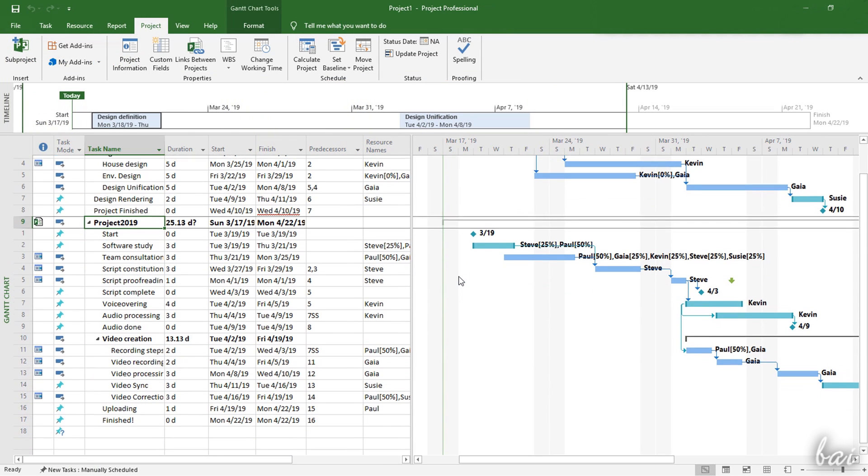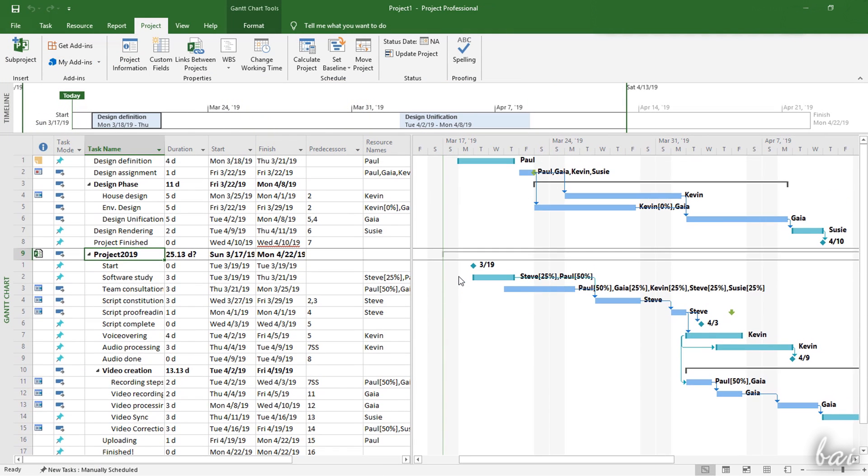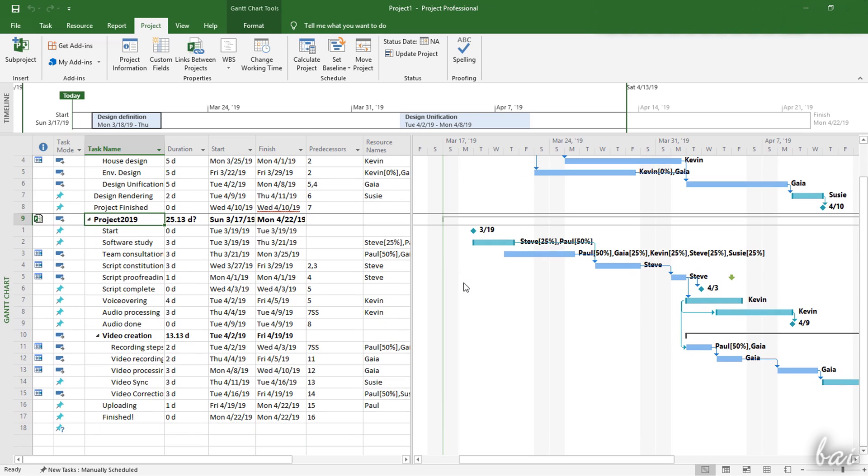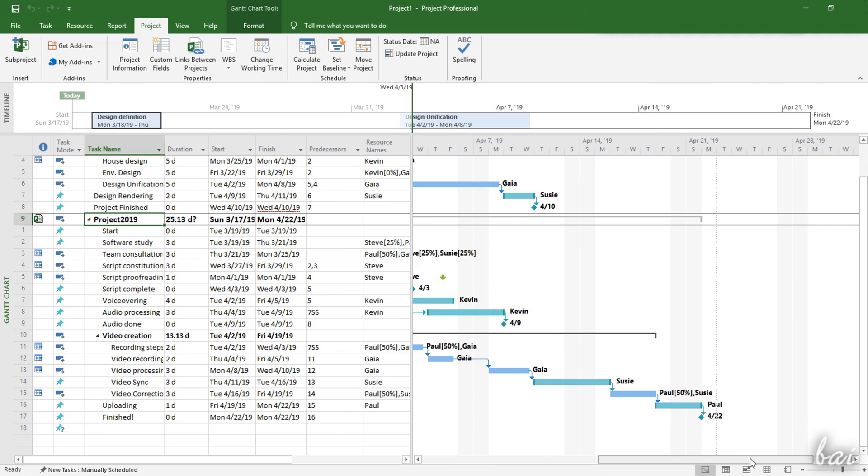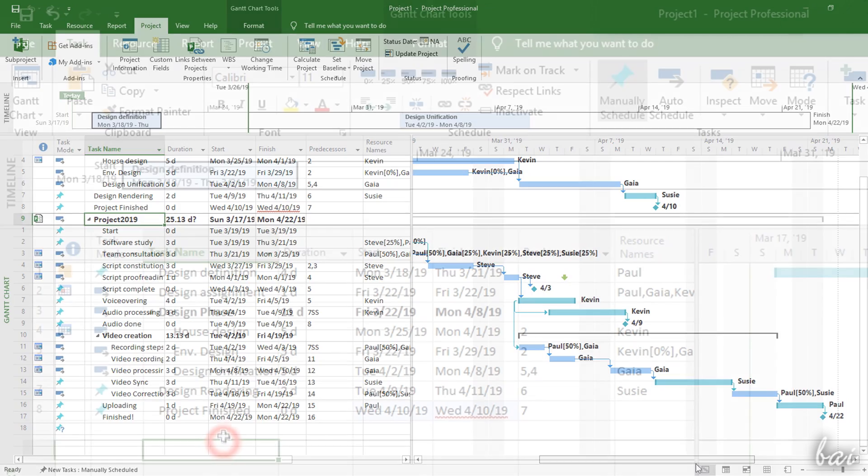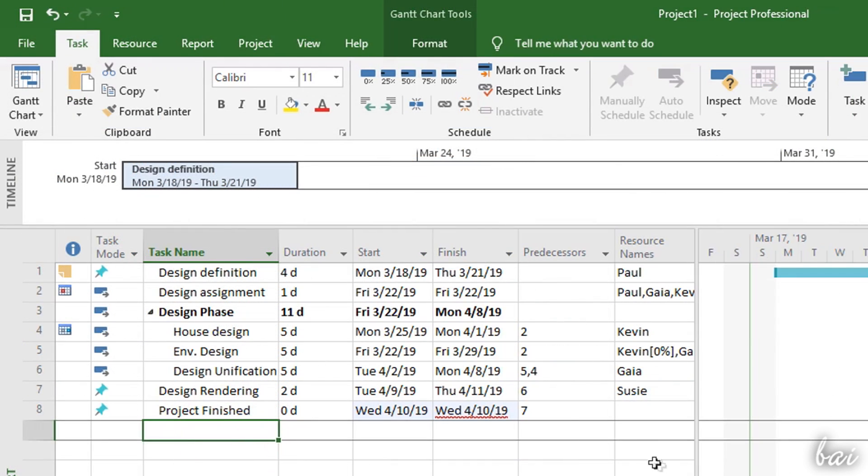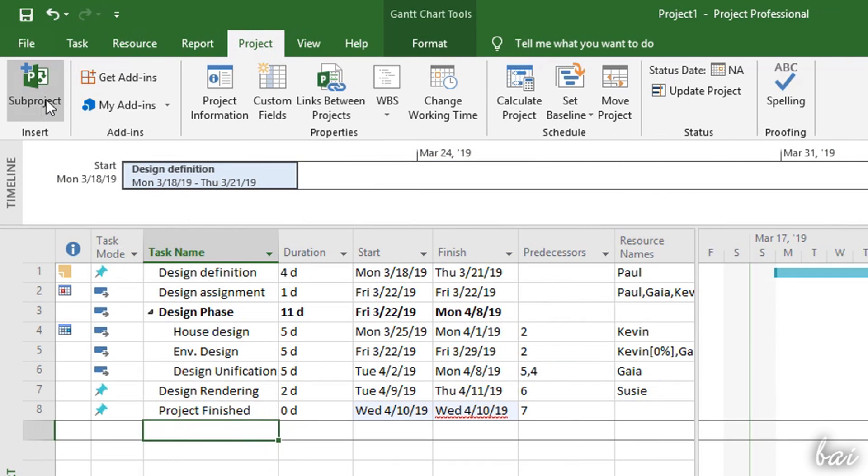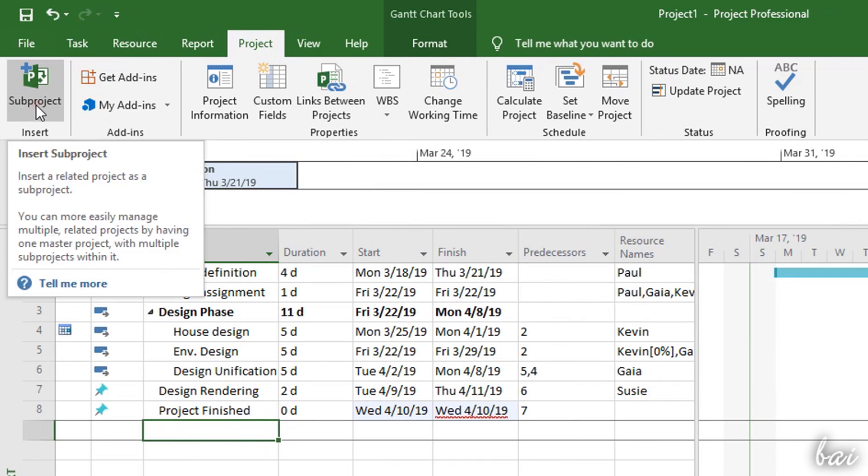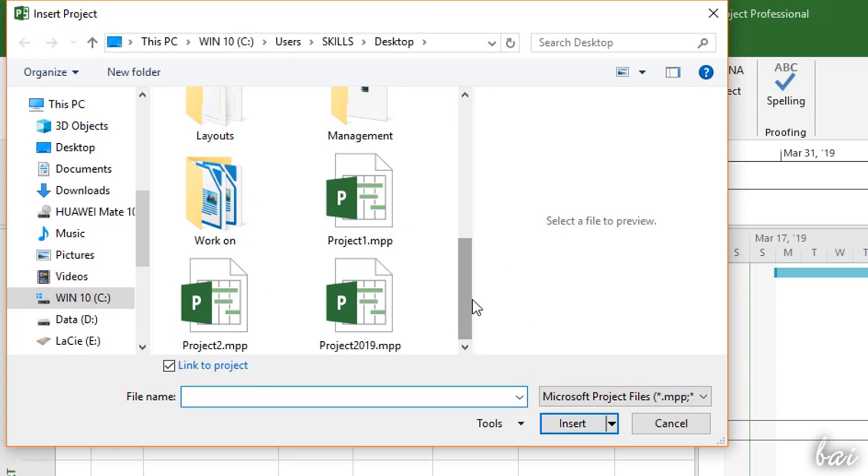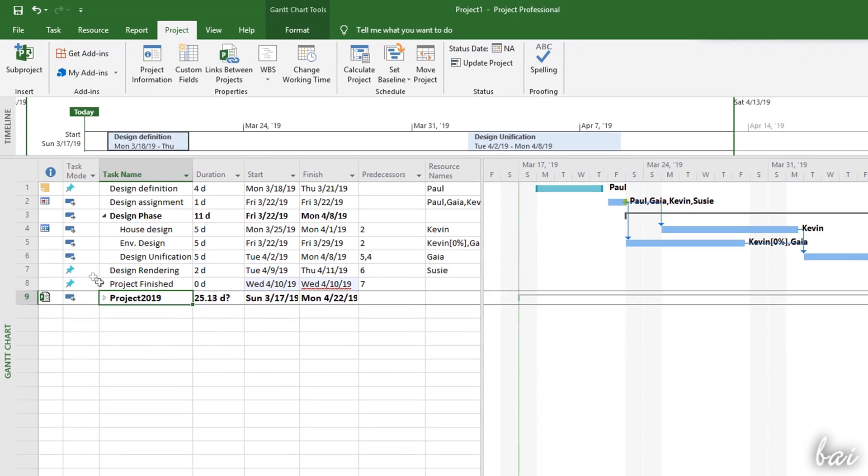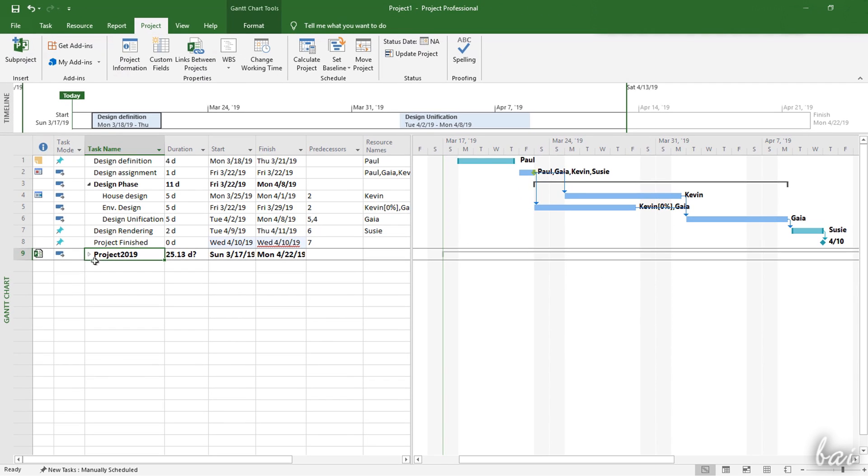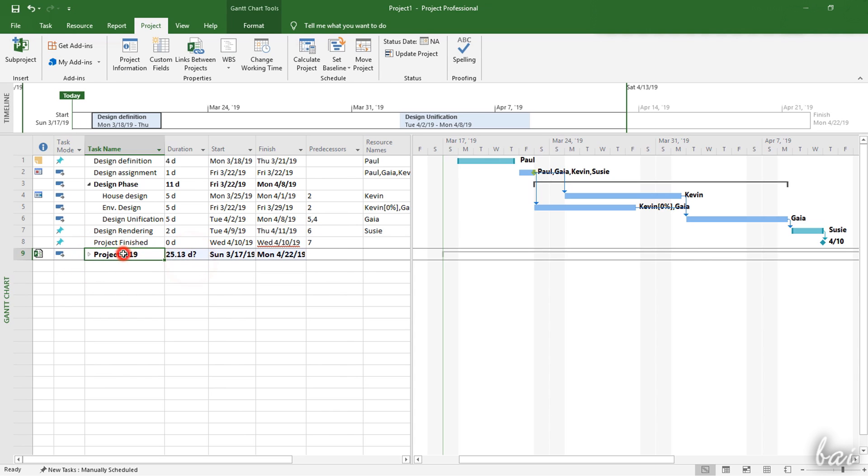In Complex Project Managements, you may need to include a project document inside another document. You can do so by going to the Project tab and then to Sub Project, browsing for the interested file. This will be added and treated just like an auto-scheduled summary, directly linked and updated to the latest version of the document.